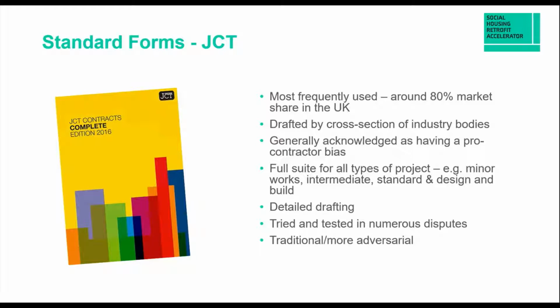In terms of bespoke forms, generally speaking, suppliers can be nervous of bespoke agreements, particularly newly developed agreements, which can require higher levels of scrutiny by lawyers, and this can potentially impact the supplier's appetite to bid for those works. But similarly, I would caution that heavily amended standard forms can also deter suppliers, so that is something to keep in mind. But generally speaking, the advantages to using standard forms are familiarity, depending on the extent of amendments, as we've said. It can be easier to price. They can reduce post-tender negotiations.